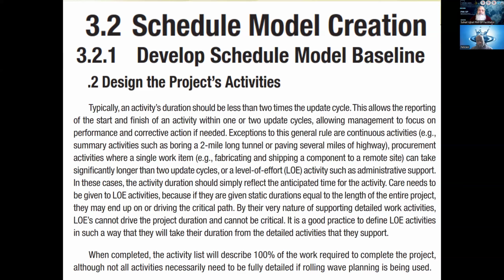So, how would we report that? Now, it is not how much you have done. We will split the activity if it is completing in two update cycles. We will say 50% is first reporting cycle, 50% is next reporting cycle.